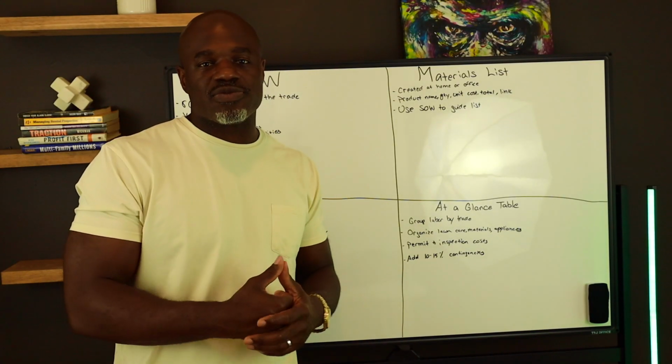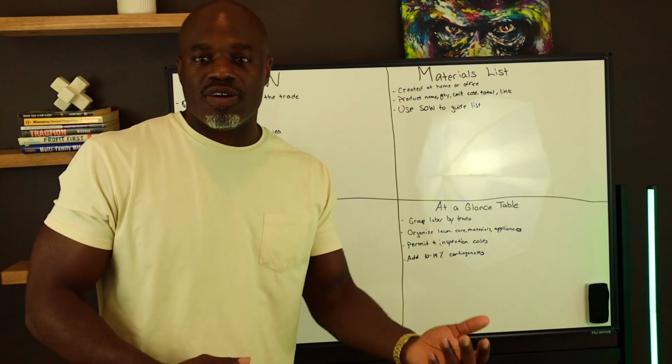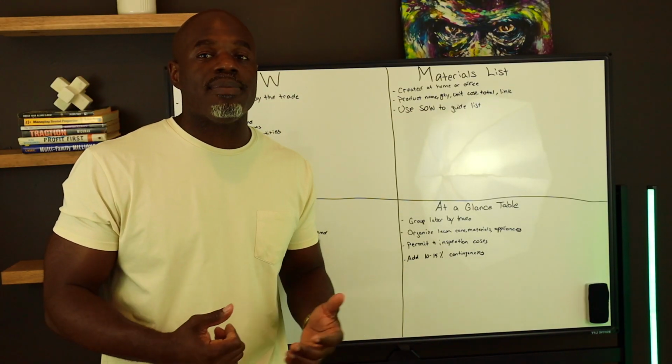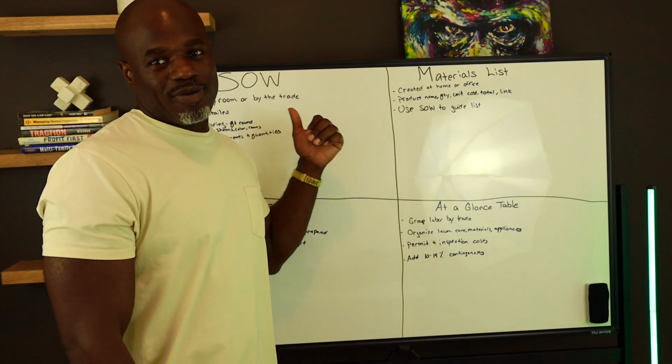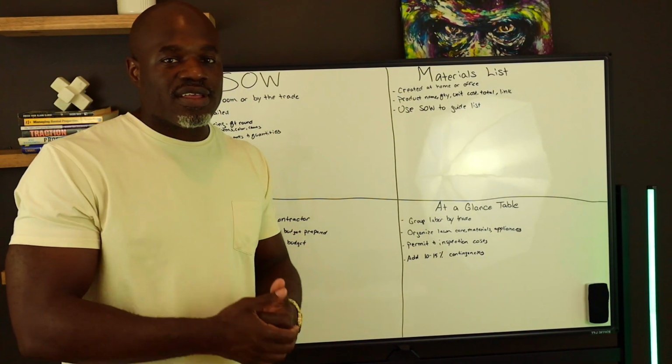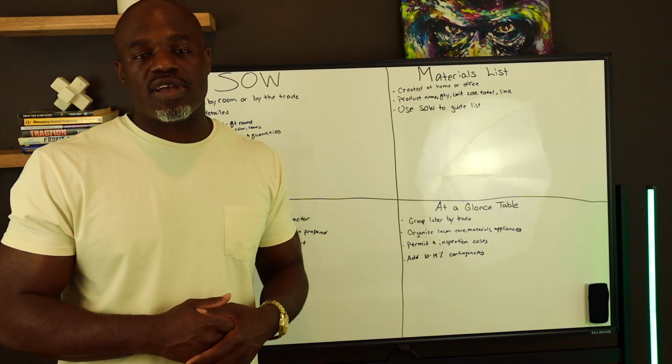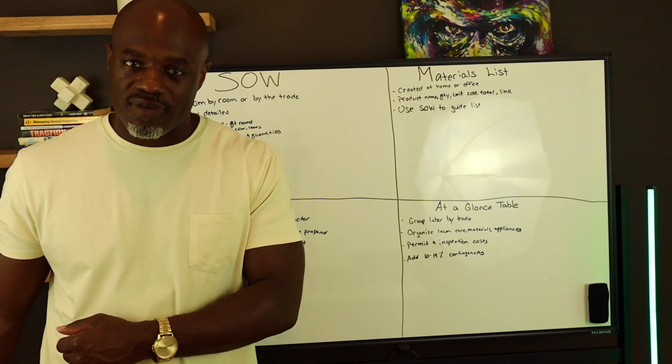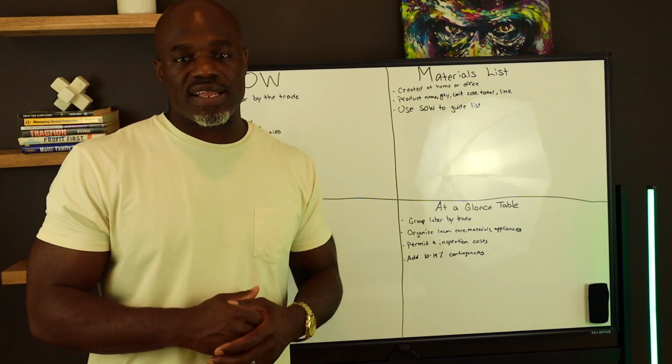Or as here in the Midwest, we get harsh winters and harsh summers. So if we have a winter where we have a pipe burst, I didn't put that on the scope to fix the burst pipe because it hadn't burst yet. But whenever it bursts, now my plumber's charging me $250, $300 to come and fix it. I can just pull it from my unforeseen, and we can keep moving like nothing happened.